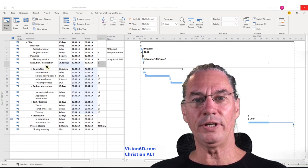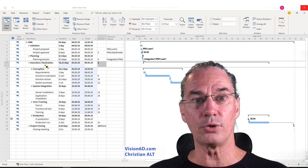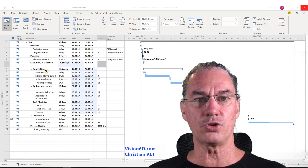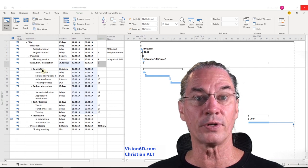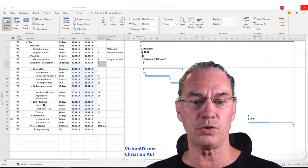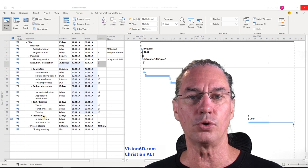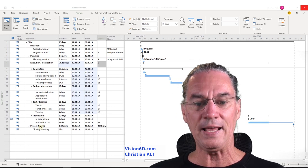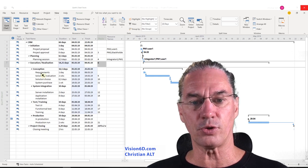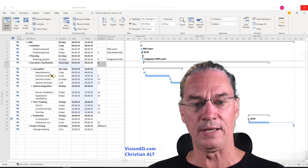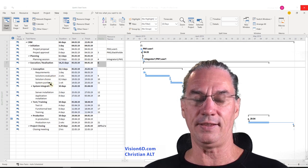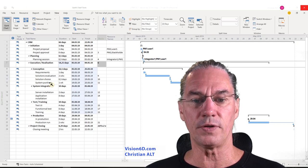Now we enter into the execution of the project — the realization part. We have a conventional approach: first conception, then system integration, then test and training, then everything goes into production, and at the end we close the project. For the conception phase, we will first do the requirements, then evaluate solutions, then choose, and then purchase the system we need.